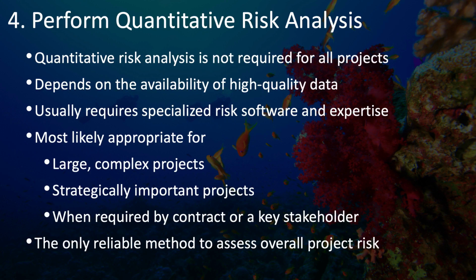You need something much more powerful than that, because as you assess all of the different risks that could happen and how they can affect each other, and how a change or a risk happening at one point in the project can affect all of the other activities around it or downstream, how it can affect the critical path of your project, resource availability and costs. So many things can be affected by this. There are so many interdependent variables that you really need some specialized software to assess all of this as a whole.